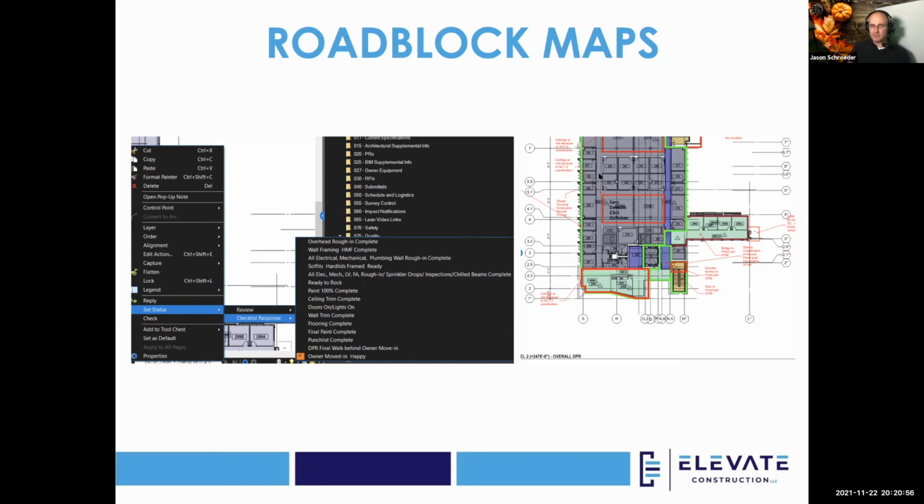So this down here is a real life job. I was a project superintendent on this project, and the owner changed the normal grid ceiling into this ACT2 type ceiling. They were like 2x5 grid patterns. They were the ones that came out and covered the actual grid ceiling, you had to wear white gloves. They were special order. It's a nasty ceiling system. But anyway, the owner changed it. And so we immediately highlighted this in red. We paused the progress from the tracking standpoint.